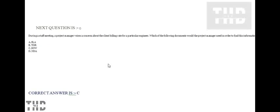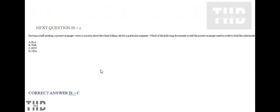During a staff meeting, a Project Manager voices a concern about the client billing rate for a particular engineer. Which of the following documents would the Project Manager need in order to find this information? Option A: SLA. Option B: TOR. Option C: SOW. Option D: NDA. Option C is correct.